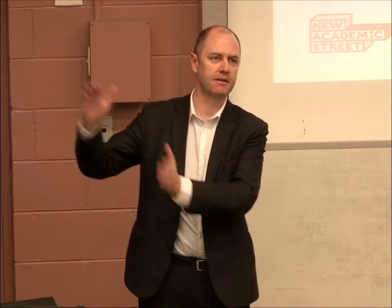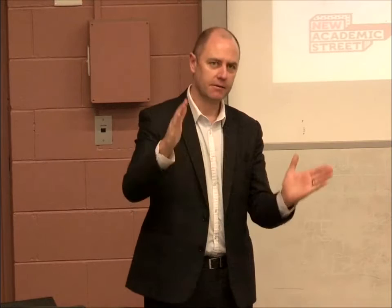What we've agreed on is that the hours of operation for the university are from 8:30 till 6:30, understanding that there's some areas of teaching and learning that happen after those times, but we've had to pick those times. So during those hours, we're trying to minimise the amount of work, amount of noise we're doing. But then after hours, that's really when the bulk of the work gets done. And we'll go through some videos explaining how that's going to work.